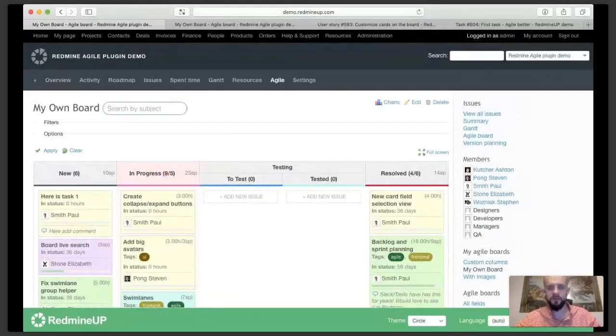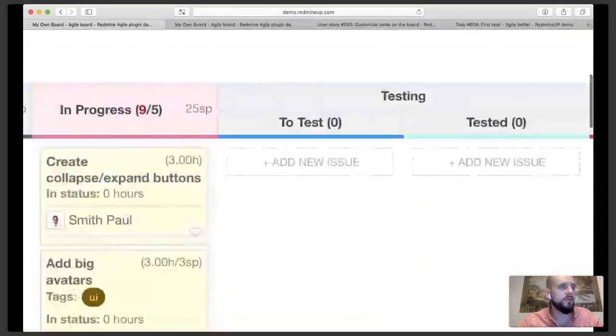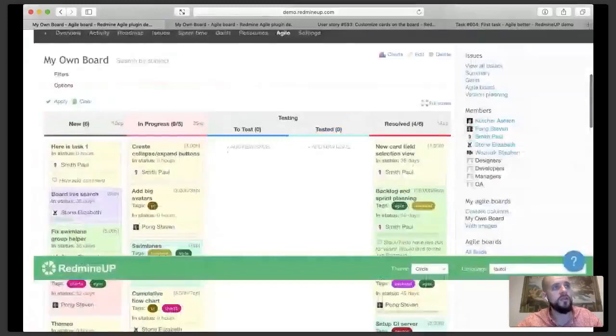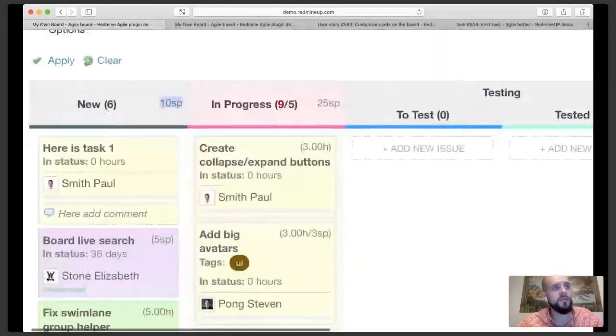For developers, once he has done his part, then he can close the issue. But maybe for business it's not so simple. Then you estimate complexity, so you assign either the hours, like you can see here in the top corner, or story points. Actually, I didn't show you: here in the status, if you're using story points, you will see the total amount of story points for all the tasks in each column, in each state.